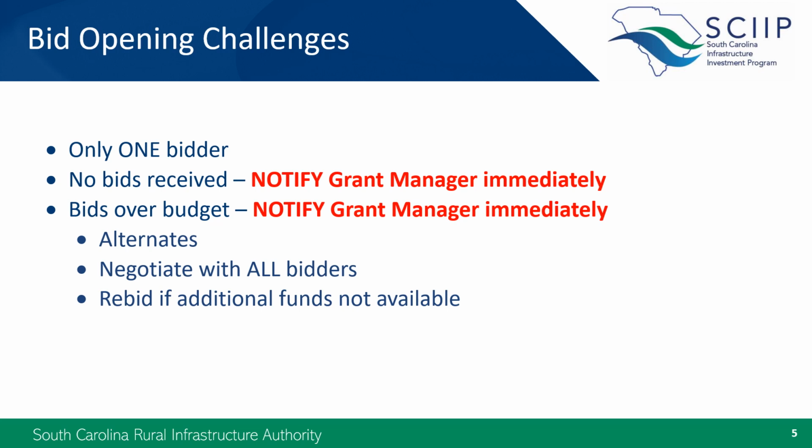Value engineering can be used during negotiations to complete the same project for less price. Value engineering should involve consideration of the use of alternative equal materials or products and procedures to eliminate construction steps which achieve the same outcome. Value engineering should not change the scope of the project unless the changes are minor or for incidental items such as fencing or driveways.